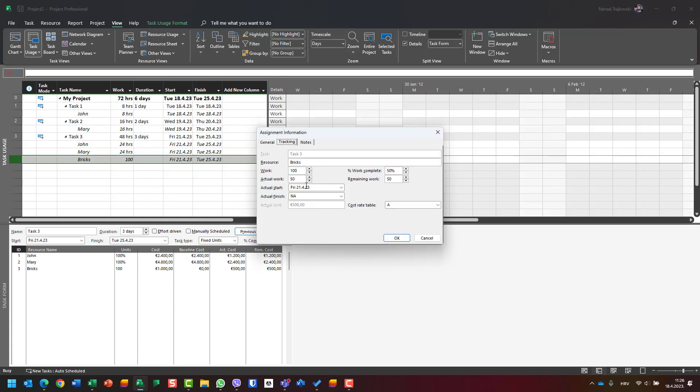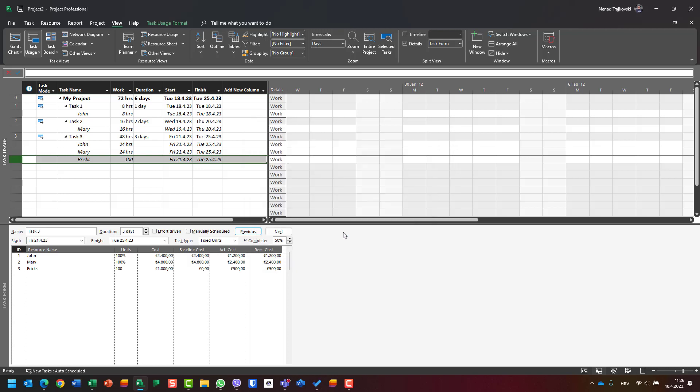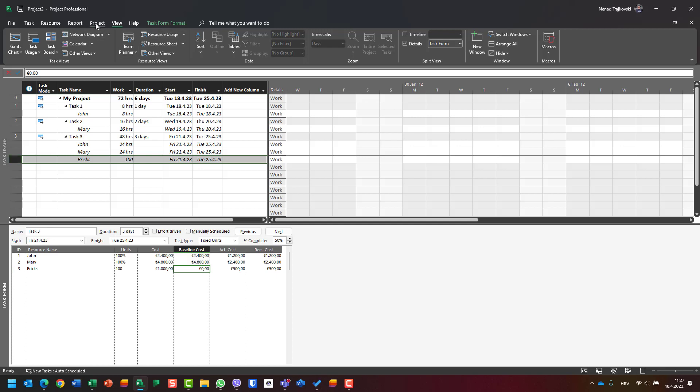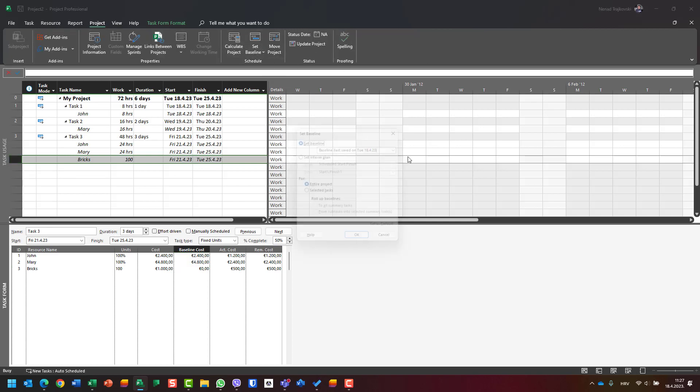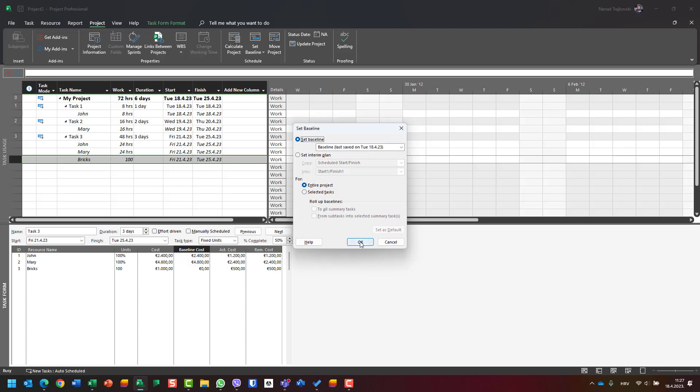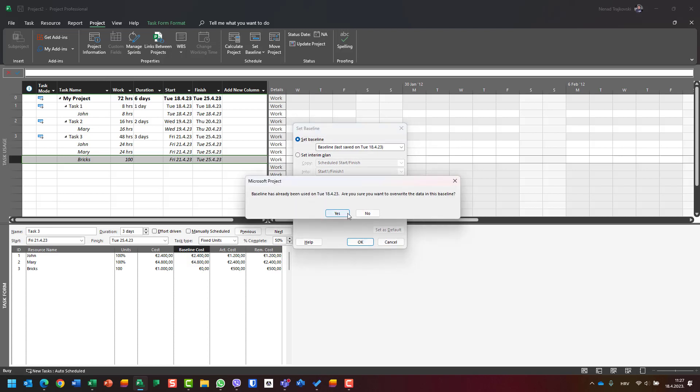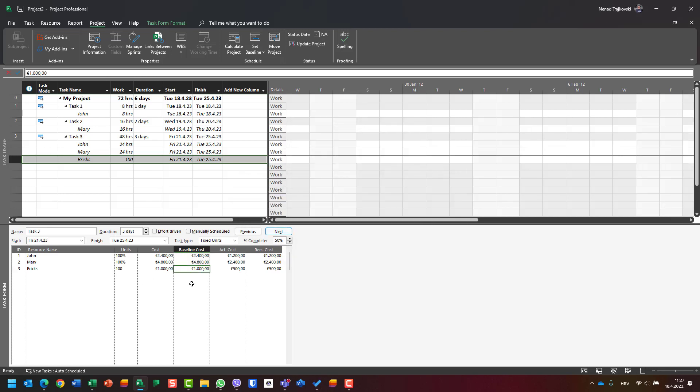The cost is 500. Everything is okay. I don't have the baseline here because I didn't save the baseline, but I'm going to do it now. Let me override the baseline. Now actual cost is 1200.